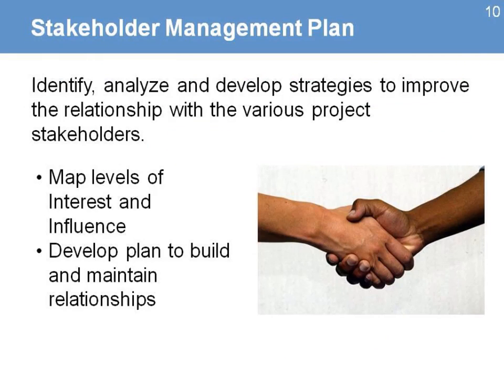The next plan is the stakeholder management plan. This is where we identify, analyze, and develop the strategies to improve the relationships with the various project stakeholders. We're going to plan based on levels of interest and influence, and develop a plan to build and maintain those relationships.